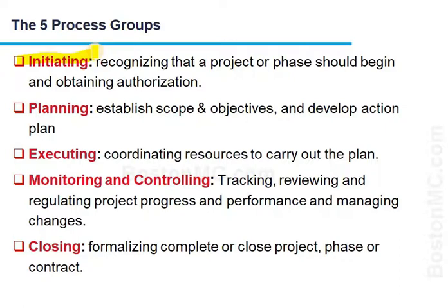The majority of the processes are going to be related to planning and project management. Almost half of all of the processes in the PMBOK guide are related to planning. Almost everything in the project needs to be planned, and these plans can be modified later on, but they need to be planned at some point. There are 49 processes, almost half. What's half of 49? 24, so there's about 23 or so that are related to planning.